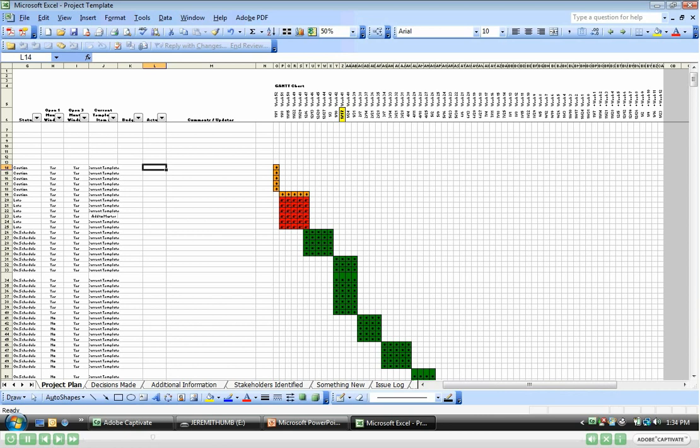Over on the left here, you see a caution, and it's hard to see, it's very small. Caution, late, on schedule. So there's color coding to this. The yellows indicate that there's caution next to that item. The red would mean it's late or projected late, and the green means it's on schedule or it has been completed. So this is just a way for you to eyeball things visually.